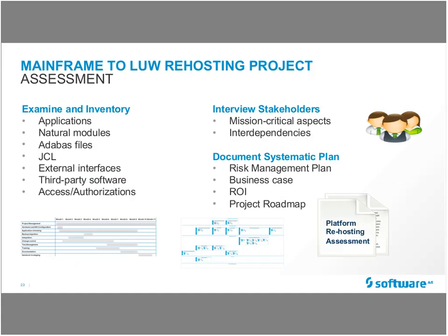So we can do that. From that, we can actually bring our GCS folks on board, and that is a paid assessment. What they do is they examine your overall application. They do a detailed inventory of the applications, the code, the data sources, all the interfaces. They interview stakeholders for what critical points there are, and then they deliver a project plan, including risk management, what the business case is, what the ROI. They give you a detailed project roadmap that you can take from this assessment and either choose then to do yourself, have Software AG GCS services do it, or a mix of the two.